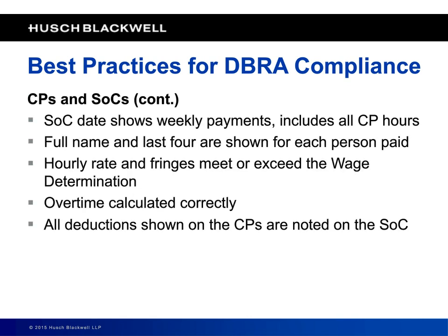Again, the statement of compliance, it has to show all the payments that were made. It has to show all the hours. They have to match up the hours that are from the certified payroll. The full names and last four of the Social Security number for each person that's paid. You've got to make sure that the rate of pay and the fringe benefit amounts meet or exceed the amount indicated on the DOL's wage determination.